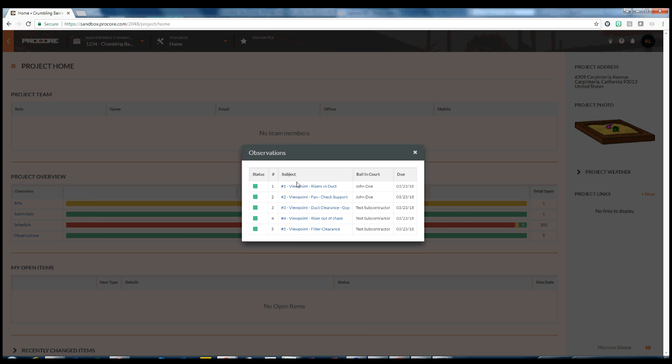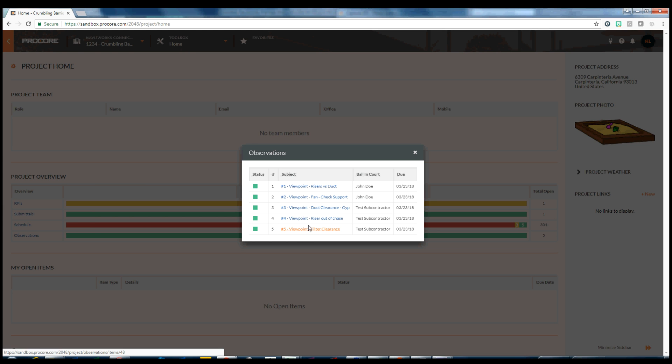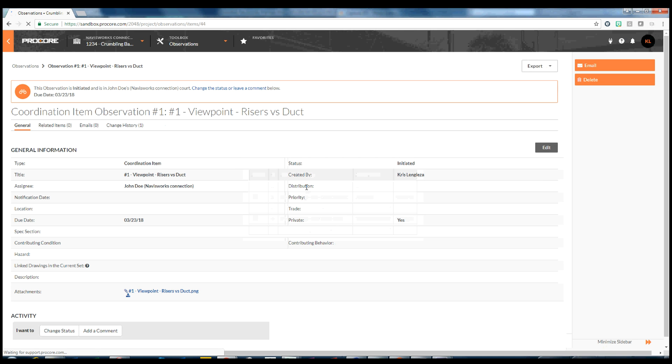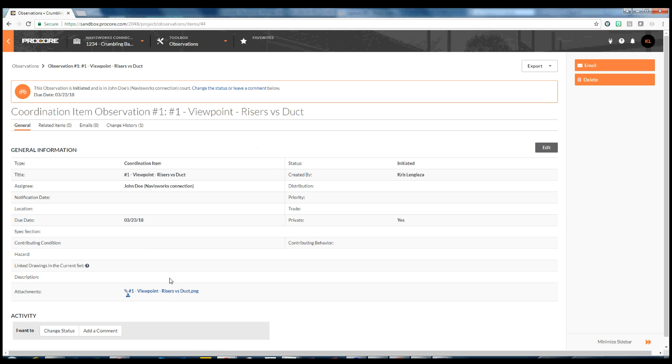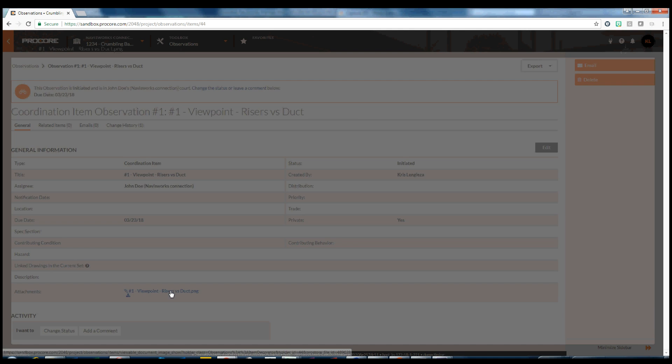Let's dive a little deeper into Observation No. 1. We can see that the viewpoint name was used for the Observation name, and the type was set to Coordination item. We have also assigned this item to John Doe. In addition, an image of the viewpoint is attached and can be viewed right within Procore.